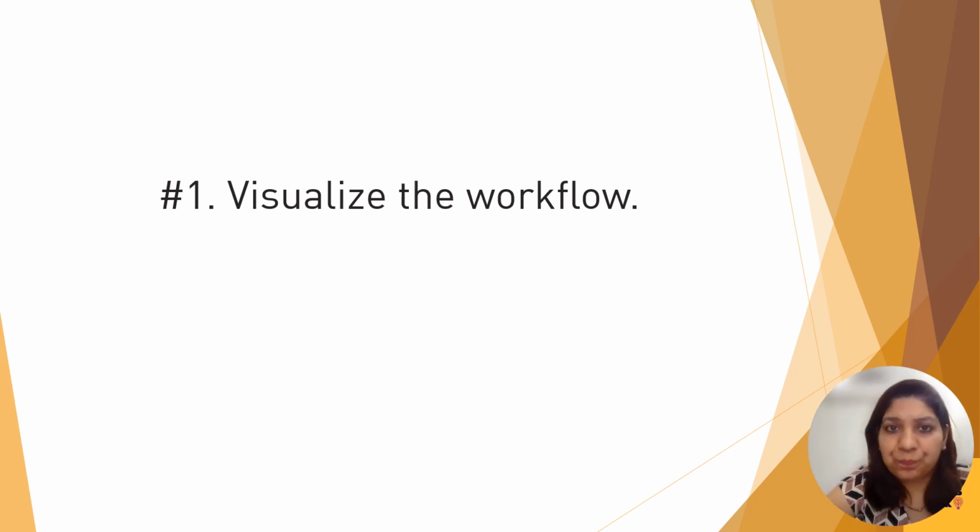There are many other ways it helps, because it essentially helps us not just to visualize but also to analyze the bottlenecks, like what is the problem area. Like we saw in that previous example, that review column was all filled with cards, and that was a kind of bottleneck, a blocker, and the team was not able to proceed from there because probably there were no further reviewers to review that work. So now we knew that this is the bottleneck, and we can start figuring out solutions for that.